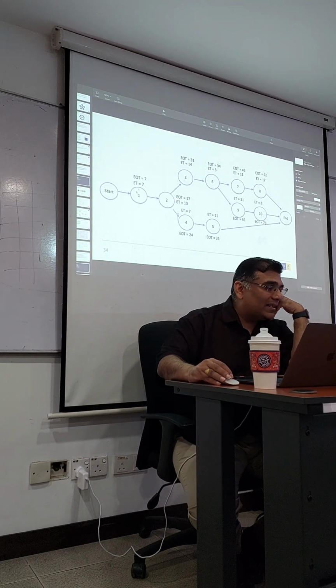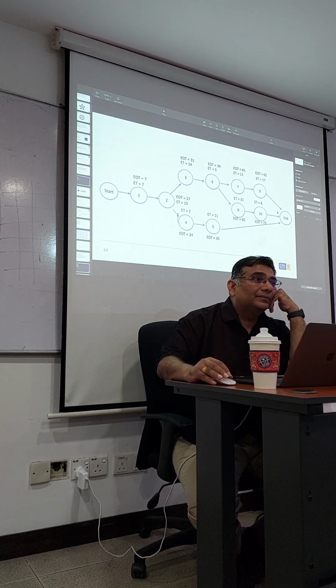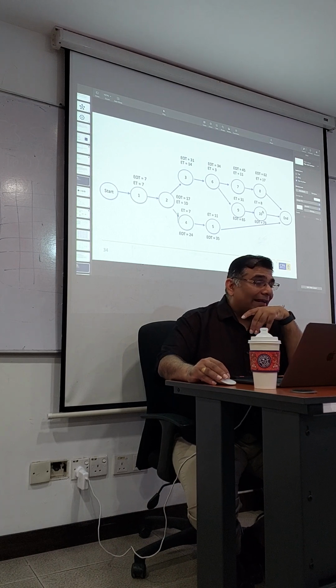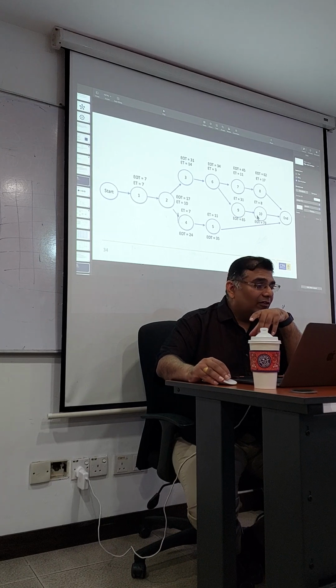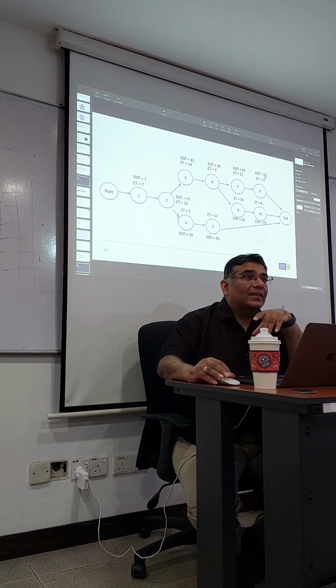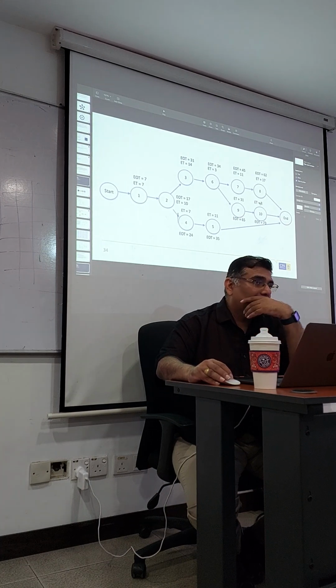The critical path analysis is 73 days. Okay, are we clear now? Any questions? So you can crash any activity here, as long as if you crash the time here, it shouldn't go above 62 days. If you crash here, it's okay. You can reduce because it'll reduce both. But the limit is 62.